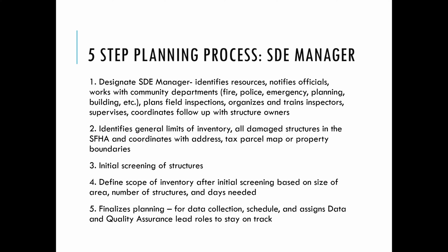What are the limits of the inventory, all of the damaged structures in the special flood hazard area, and then coordinate those addresses and get a tax parcel map or property boundaries. So putting together a map is very helpful to help you establish your scope and identify which properties need to be assessed. So then you can do your windshield assessment, which basically means you drive through these disaster areas as soon as it's safe to do so, and then start prioritizing which ones need to be looked at first.